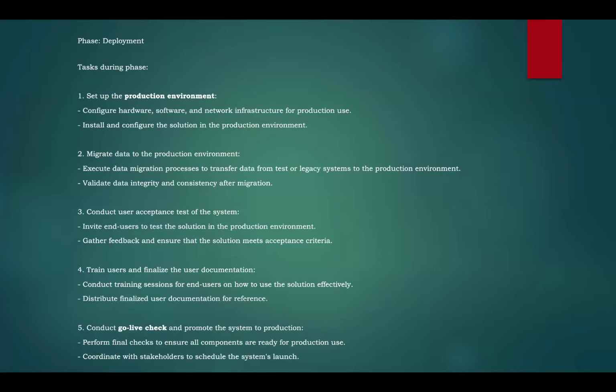Yes, all these setups and configurations are done. I mean, there's a big checklist. So once we get a go ahead from Microsoft, we'll start giving it to the users. Users are going to start with very small transactions. So let's say in their legacy ERP daily, if they're posting some 100 or 200 invoices, in D365 they'll start with some 10, 20, to see the errors. If there are any errors, or challenges they face with the system, slowly, phase by phase, they're going to adopt D365 as well.